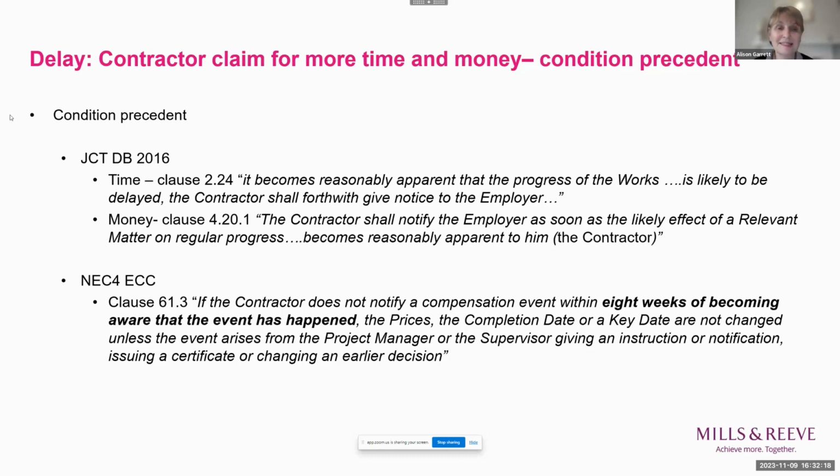Firstly, there's no need to have the words condition precedent for something to be a condition precedent. If the wording if is included, as it is at the beginning of the NEC4 clause that I've just mentioned, or if the wording provided always that is there, then that's an indication that you might be looking at a condition precedent.